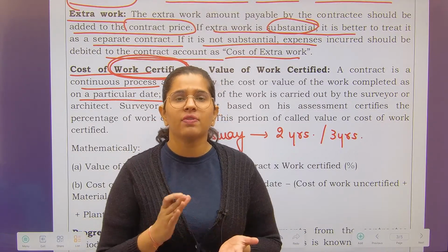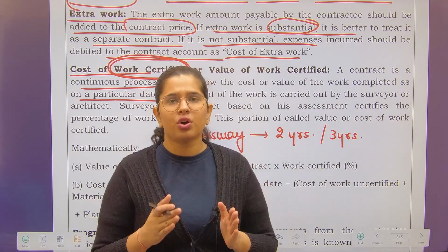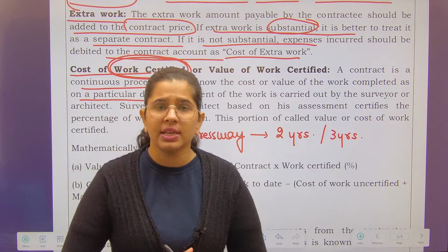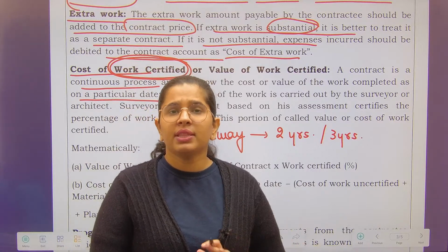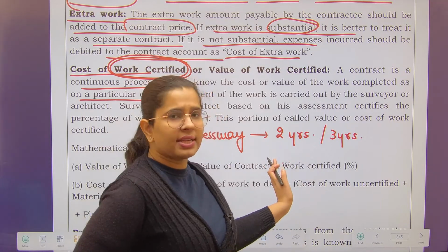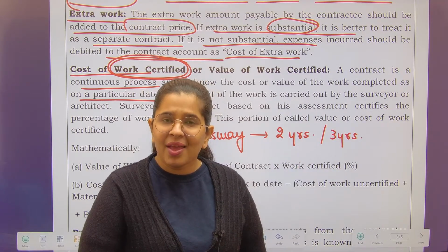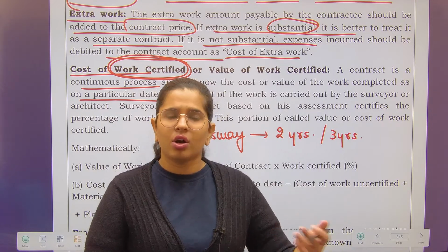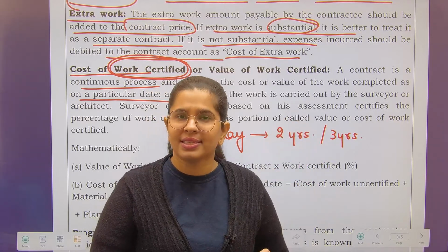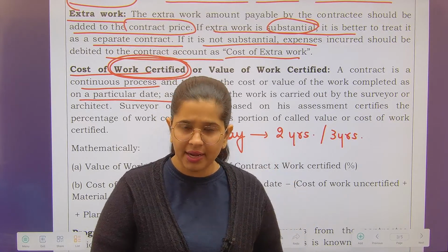Now once construction of 60 kilometers has been completed, the contractee will give me the portion of contract price which can be allocated to this particular stretch. Obviously, the contractee has promised me that he will give 90 lakh rupees. Now, shall I ask for the 90 lakhs after the whole work has been completed? If I work in this way, then I'll go bankrupt, right? Because I'll not have any money to incur the cost. So what I want is that the contract price should be received by me in proportion to the work done by me, right? Understood?